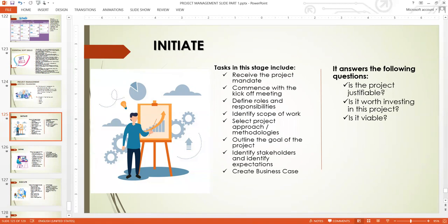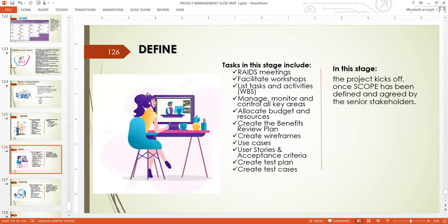And that is where the solution architecture starts. That's why we design our solution. At this stage we should be encountering risks within the project, and it's time we start capturing such risks with a risk log. That's why it's important you start having a regular meeting as a team. It becomes a statutory meeting that every week you have a risk meeting.